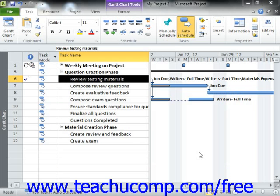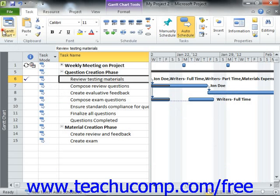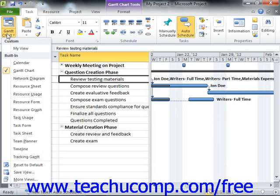After you have created your work resources, you can designate various cost rates for the resources within the Cost Rates table shown in the Resource Information dialog box on the Costs tab. Within a Cost Rate table, you can have multiple pay rates for overtime and standard pay, and also specify the effective dates when the rates should be applied if the pay rates change mid-project.